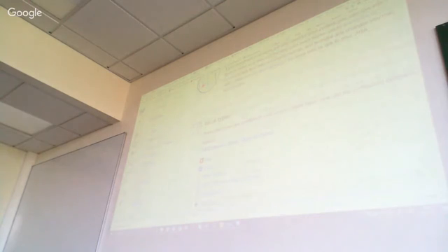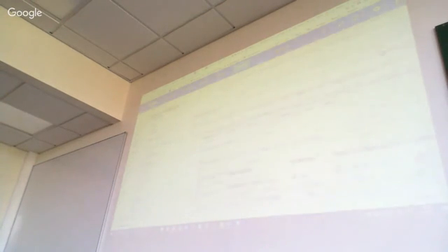What I'm sort of uncertain about is I've looked through different descriptions, but everything seems so general that you basically just make up your own descriptions anyway. So, for instance, adding subtasks seems to depend on the situation. Should a user story have subtasks, or should you just say you are finishing a user story? Because if your user stories are small, then you don't actually need subtasks.